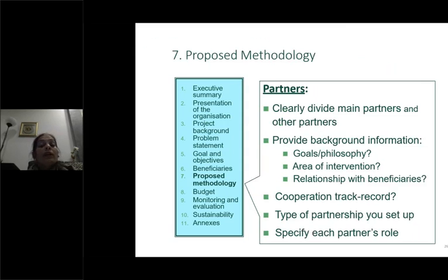And then it should clearly divide the work. This is very important because nowadays, not only for projects but even for publications, if you submit an article manuscript to a good high impact publication, if you have 5 authors, they will ask you what work has been done by each author. Similarly, in a project, we should clearly mention which partner, which PI or co-PI is going to do what. Suppose I have expertise in synthesizing, my co-PI has expertise in modification, and the third co-PI has expertise in application.